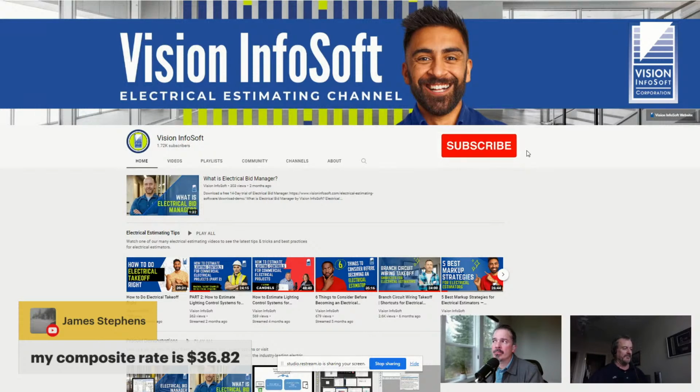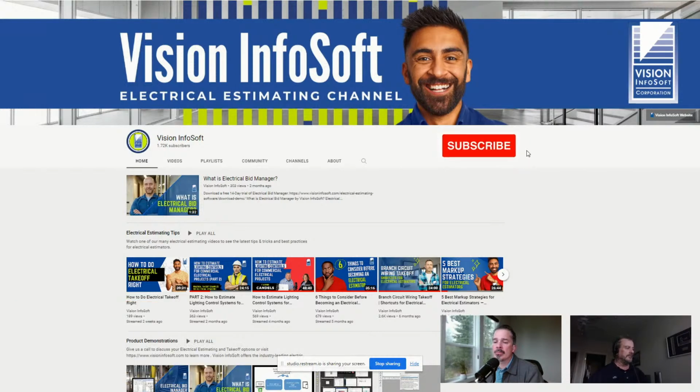Some companies pay no benefits. Some companies have a very comprehensive benefit package. But that should all be included in your composite rate, and you need to average that out over your crew that gets paid different rates. You typically pay a journeyman obviously more than an apprentice, and probably pay a foreman more than a journeyman. So you need to look at, historically, or at least over the last few months, what percentage of your electricians are getting journeyman pay, foreman pay, apprentice pay, and then you can figure out the composite rate from that.